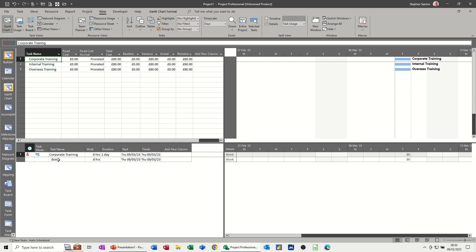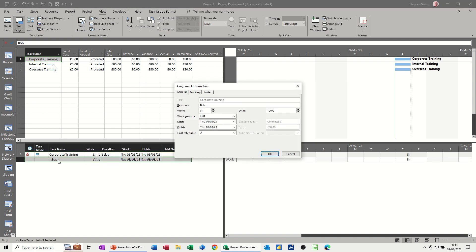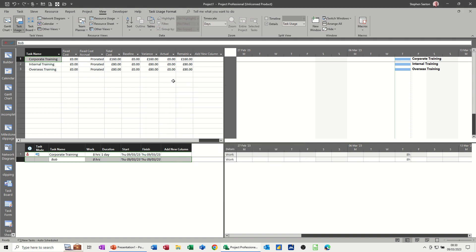If I double click on Bob, so at the minute, the cost sheet coming through is cost A. But corporate training, let's say corporate training is coming from cost sheet B. When I click OK to that, he now gets £160 because the rate is higher.